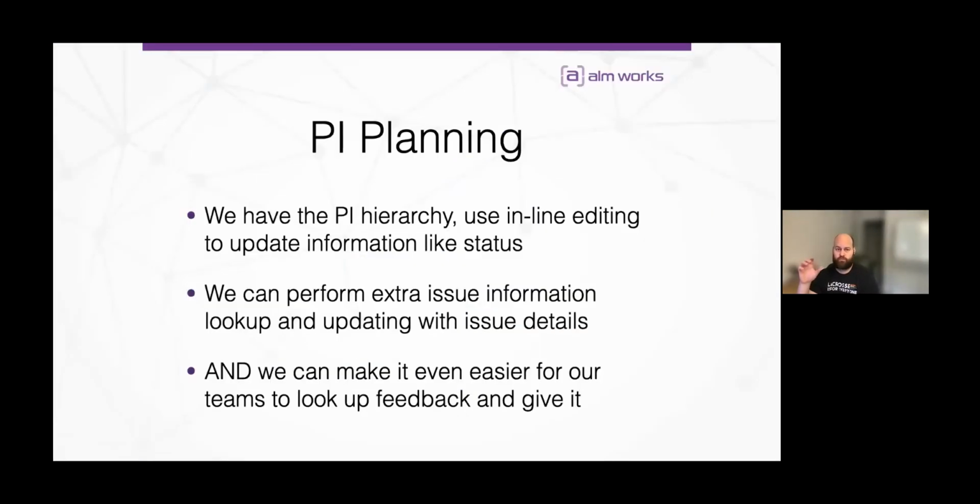Last thing I want to mention from a rituals perspective is PI planning. So for those of you who've never been a part of a PI planning session, in the old days, you were recommended to all go to the same place, and you would spend 2 days horse trading and haggling over what work we were going to do this quarter. I don't know if it's considered blasphemy in the right safe circles, but PI planning is glorified quarterly planning. Except it has the teams directly involved. They have input on what's happening, what can we do, can we do it in this order, stuff like that.